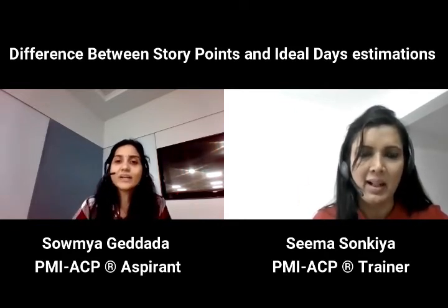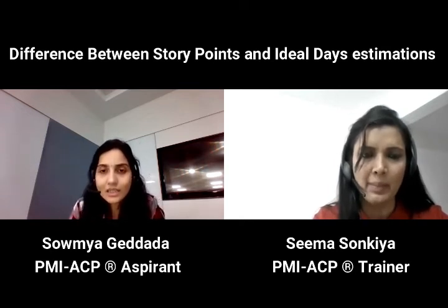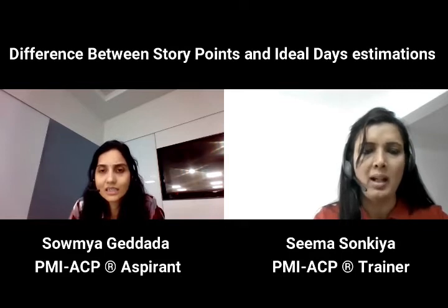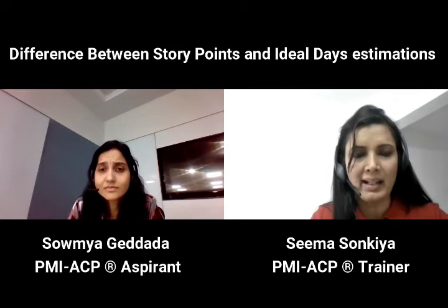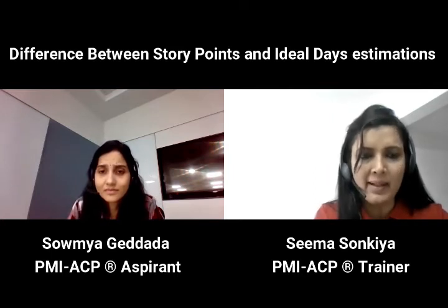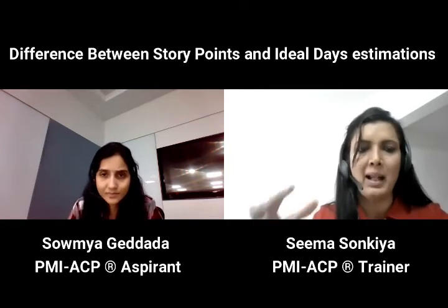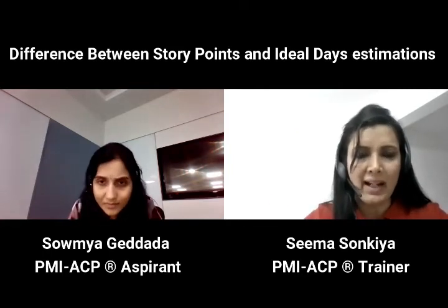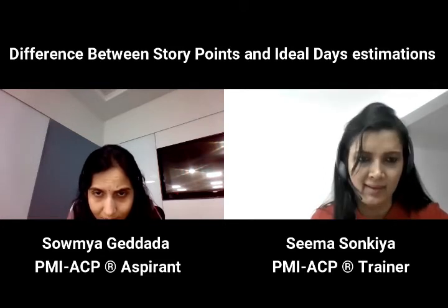So that means I'll get all my estimates. If you are having some issue in predictability of how long this work will take and how much it will cost, then take help of SMEs, some developers, testers, a representative team, involve them and get estimates, include a variable factor, and come up with a budget which makes business sense.